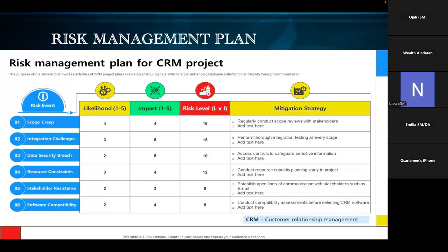And what will be the impact? The impact is very, very high. 5 also. Why? Because if you don't have light, you can't have your presentation. You can't even have the meeting at all. So you see that the severity is very high. So what will be the mitigation? Get a standby generator, get a solar system in place, backup. Okay. So those are mitigation plans.